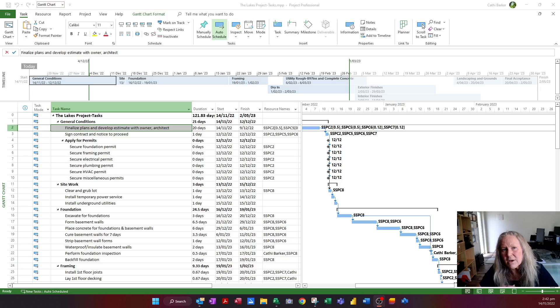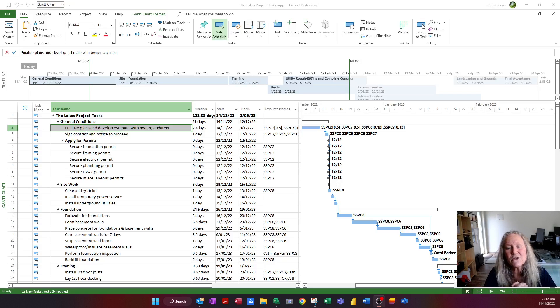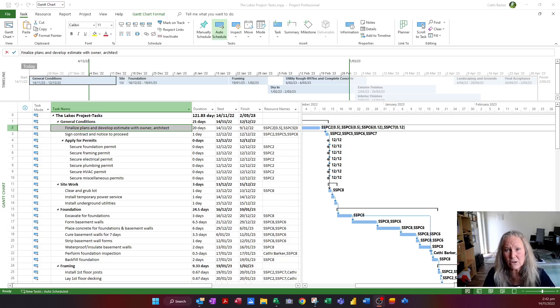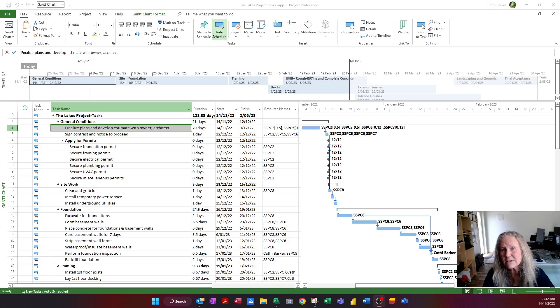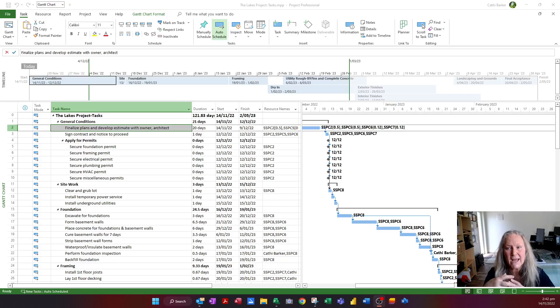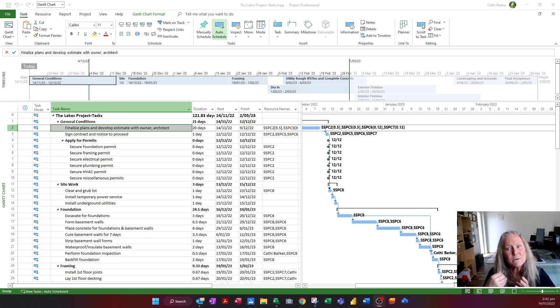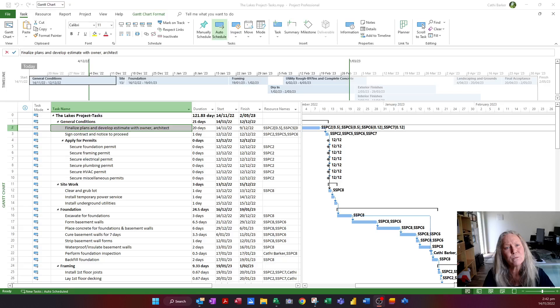But I mentioned in the earlier video, if you've got Microsoft SharePoint Online as part of your Office suite, then you could actually publish your project file to SharePoint. And then you could use SharePoint to get people to add tasks, update tasks, and that would immediately come back and update your project plan in Microsoft Project.